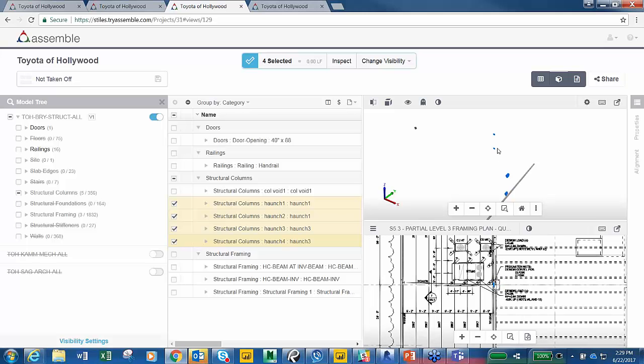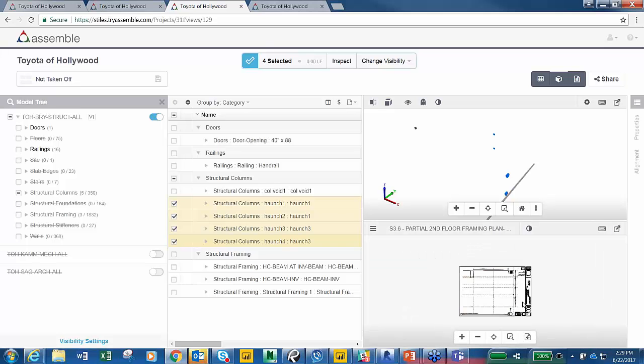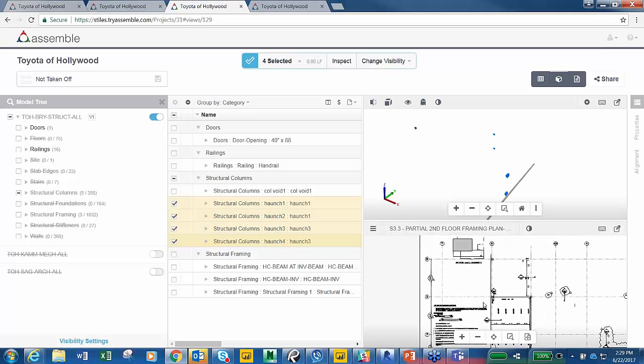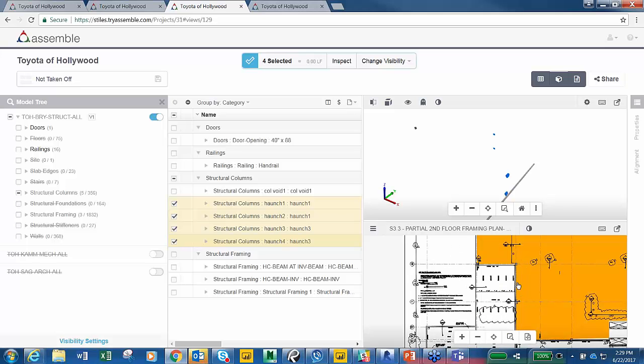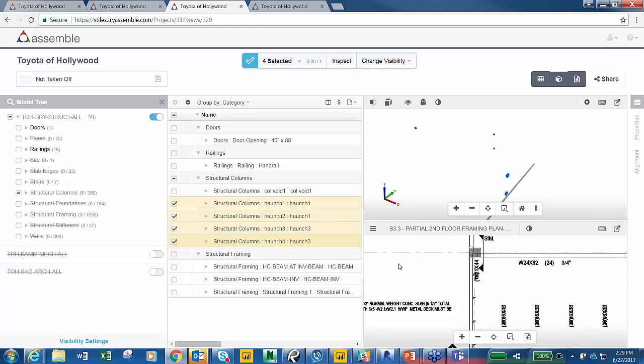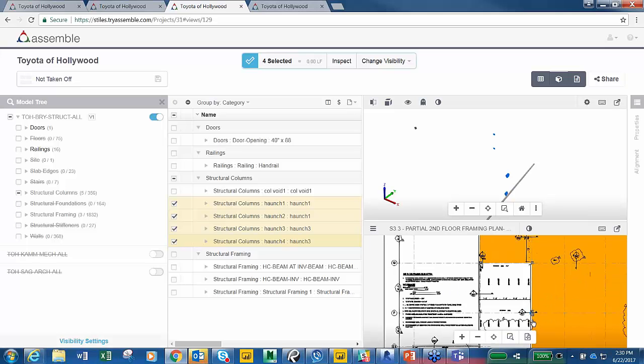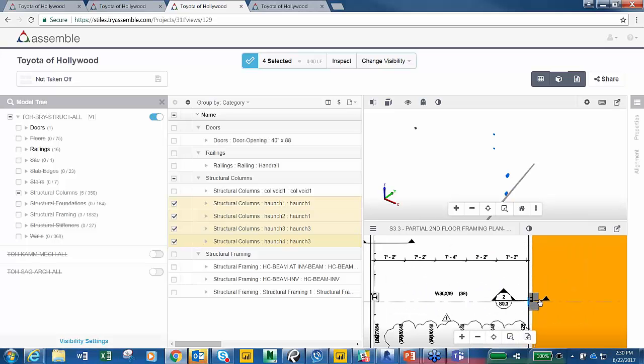The other thing that I'll notice is they're at 2 different levels, okay? So I've got level 3 right here that I'm looking at in this drawing, so let's go down and take a look at level 2. I'm going to drive into level 2 here, and it's not the best view. Let's find the right one. Here we go. So we're going to drive into that same area there, and this is that same area from the second floor, and I'm zooming in, and I've got those highlighted there. You can see them. Here's another one highlighted down here that shows up on the second floor, but there's no note on this level. It's not telling me what those things are. I probably would have missed that in 2D.